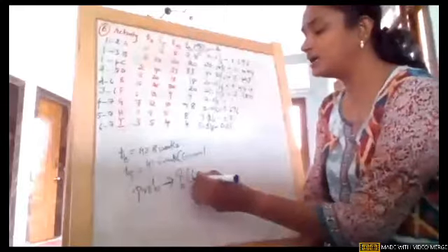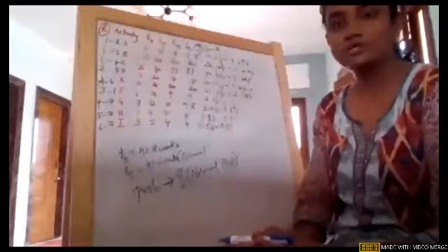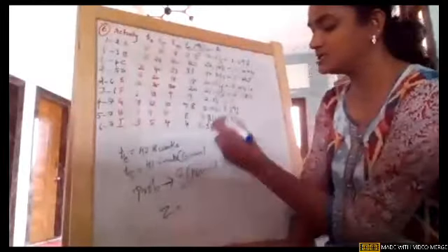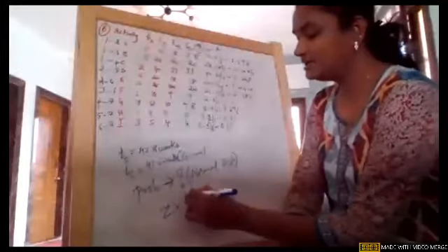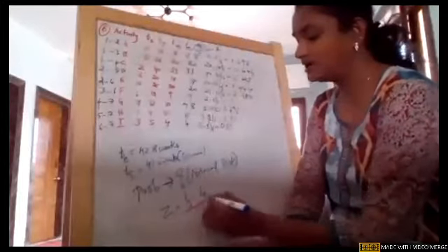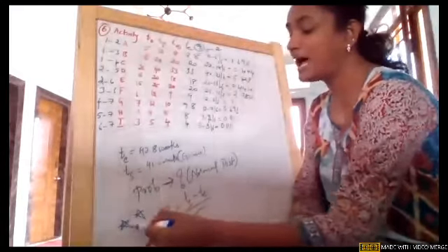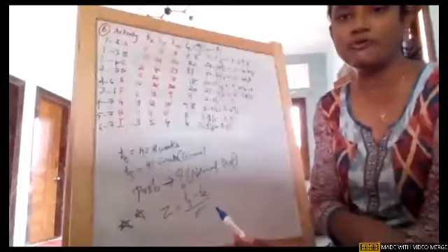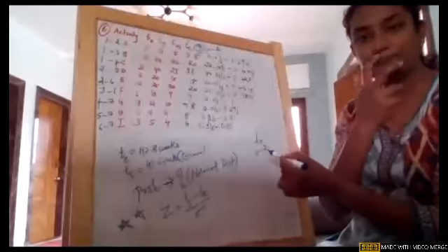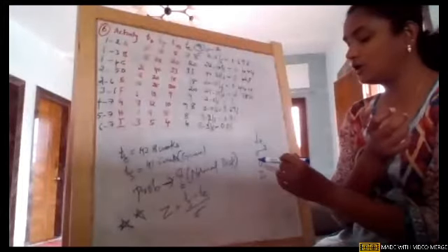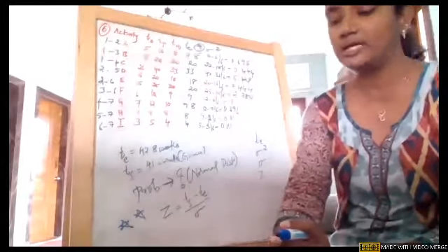Because it is probability, we are using the normal distribution from statistics, which you all studied. If you remember the formula for normal distribution, I just wrote it, but as per our convenience we will modify it. It is TS minus TE divided by sigma. This is the normal distribution formula. This is also an important formula as per the PERT technique. In PERT, we have formulae for TE, for sigma square or sigma, and for the normal distribution. These are the important terms which we use in PERT and we need to remember them.